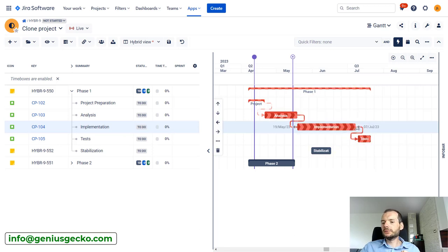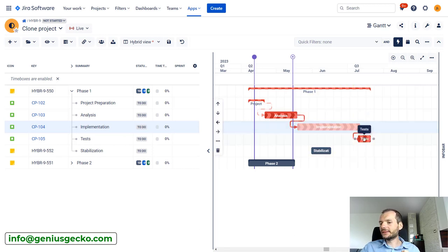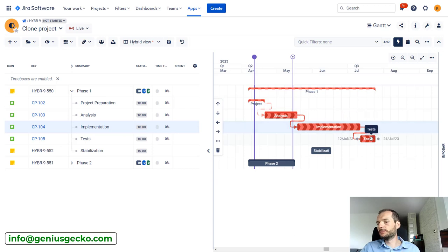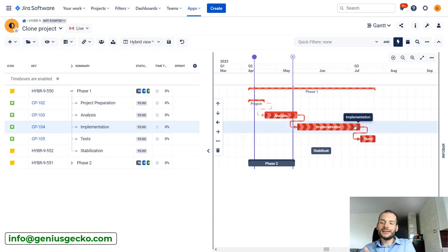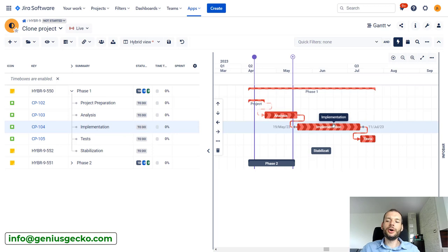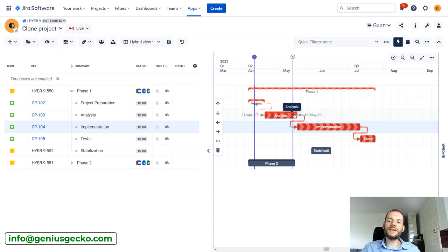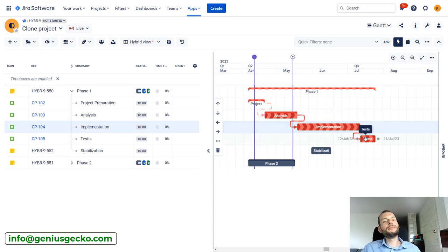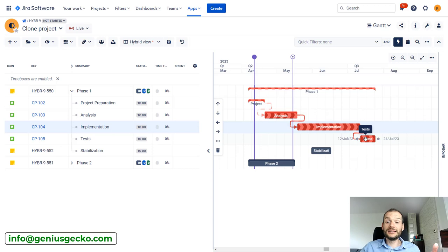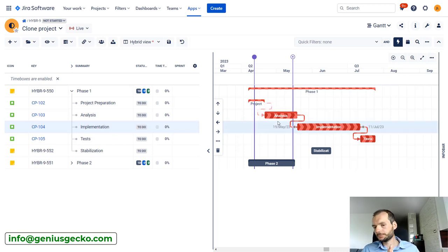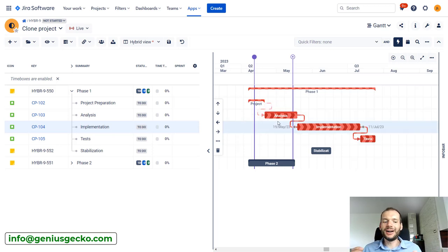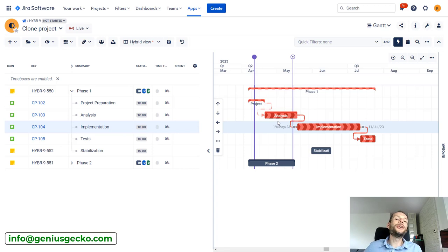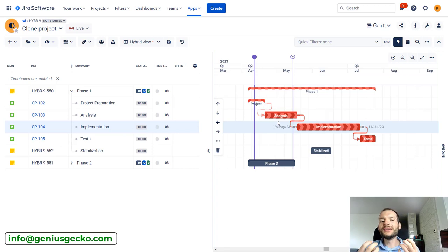So you can see that if I make this task end earlier, this one is moved. This is why this is also on critical path. If I delay this task, both of these will be moved. That's why this one is also on critical path. Makes sense so far, right? Delay in the task causes delay in the project. This is why the task is on critical path.